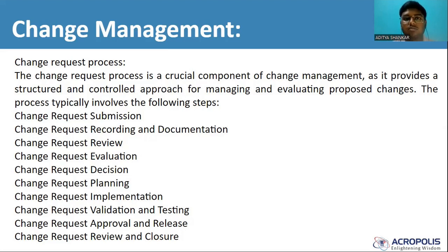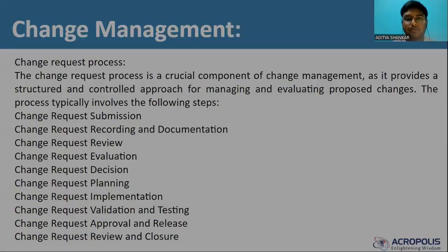Then comes validation and testing, that after we have implemented the change, the software is working fine or as per the expectations. Then comes approval and release, that the client side or the testing side approves it and then it is released. And finally, it is review and closure.